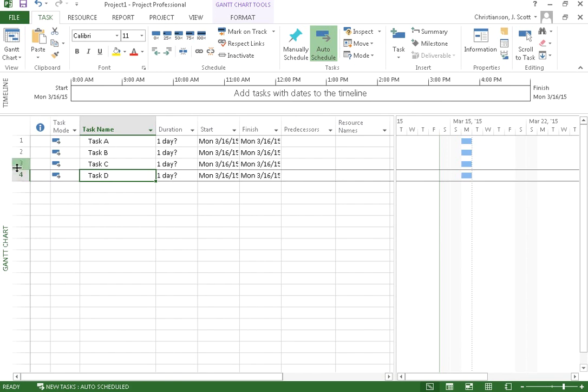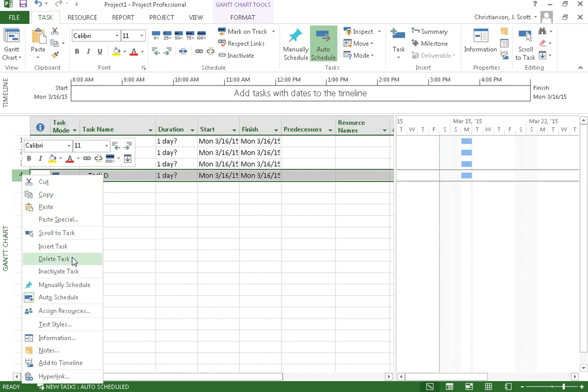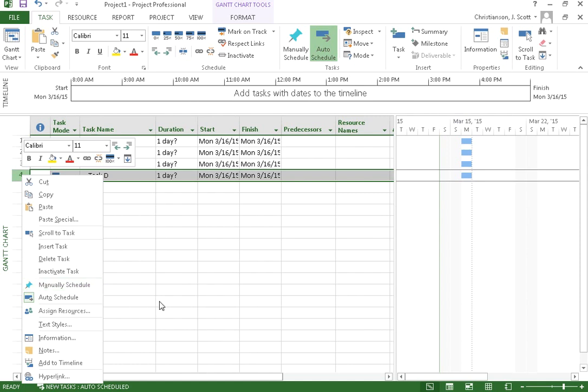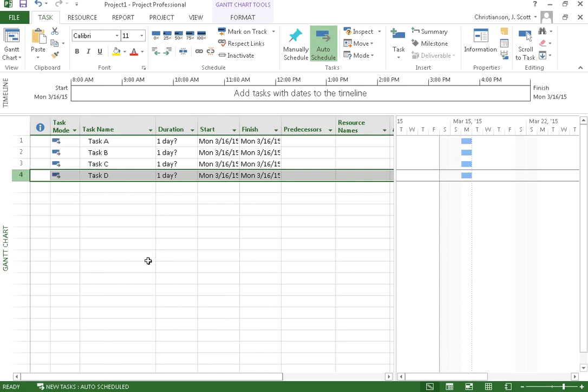You notice if I right click, I can also delete a task and I can also change some of the properties. I can make it inactive. I can schedule it manually if I wanted to put a constraint on it. As I mentioned earlier for these lessons, we're going to auto schedule everything.